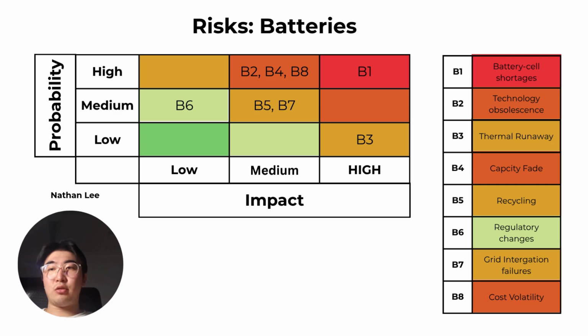These materials are essential to battery production and are subject to price fluctuations driven by geopolitical tensions, supply-demand imbalances, and increasing global competition, particularly from the electric vehicle sector. These fluctuations create substantial financial uncertainty, especially for large-scale projects requiring long-term procurement planning.